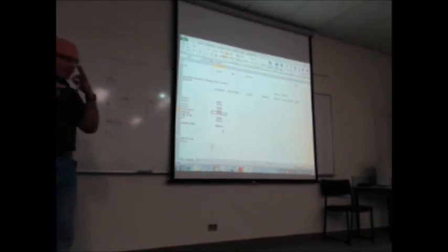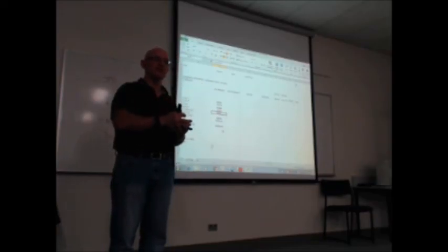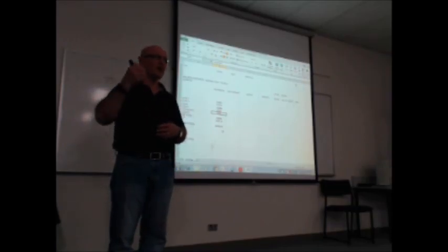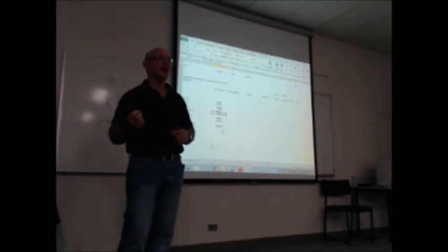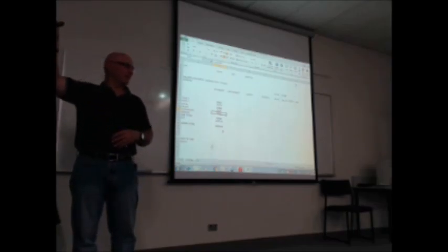This is the hard part about building. When you've got everything finalized in front of you, the plans, the specifications, the color selection, it's easy to price the house. It's when you haven't got those prices and specifications in detail that you're guesstimating. You're trying to read somebody's mind and pick out what they want. And a lot of the time you're going to err on the lesser side because you want to get the job. The downside of it is you lose money.